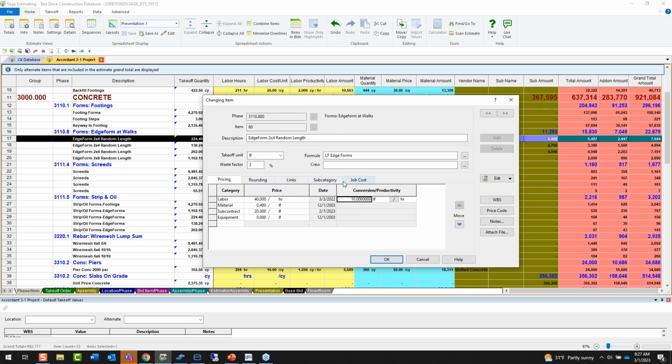And the other things that we can do in here, I'm not going to get into all of them, but if there's anybody that is working with our accounting system, we have the cost code structure that we can send that information into and build out that budget for you. If you're not using our accounting system, we still can have a cost code structure that we can spit out from here and flow into whatever solution that you're working with.